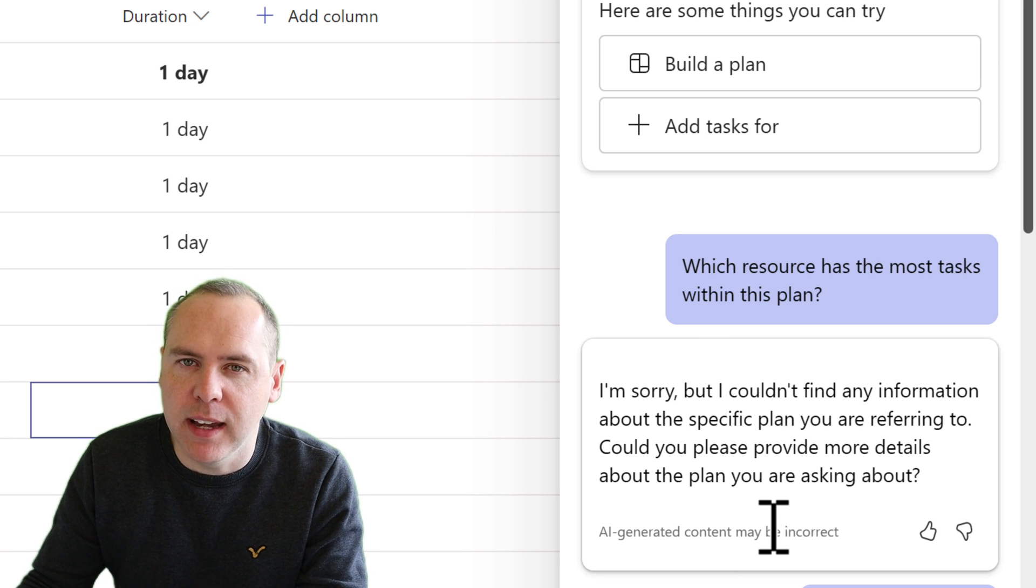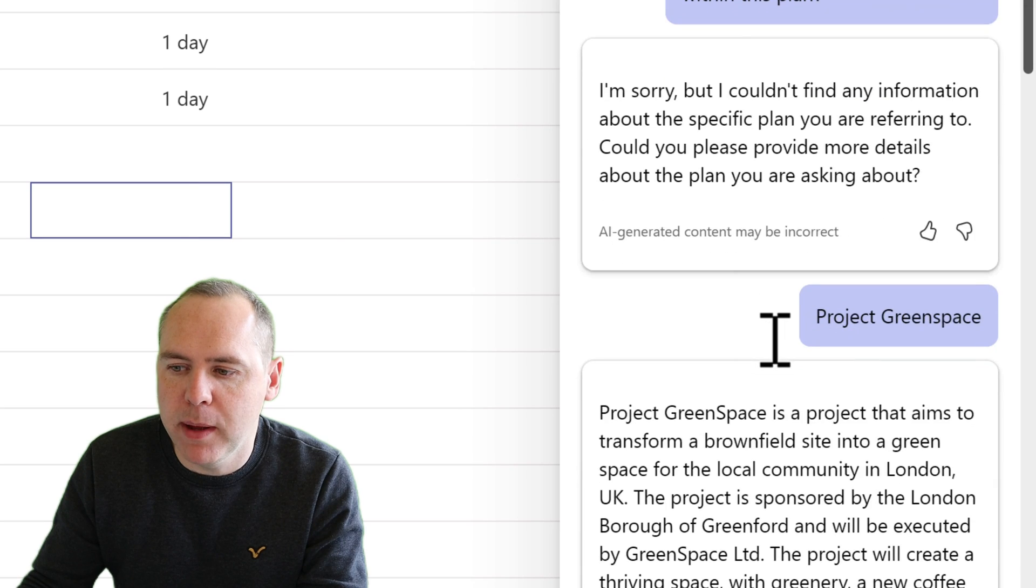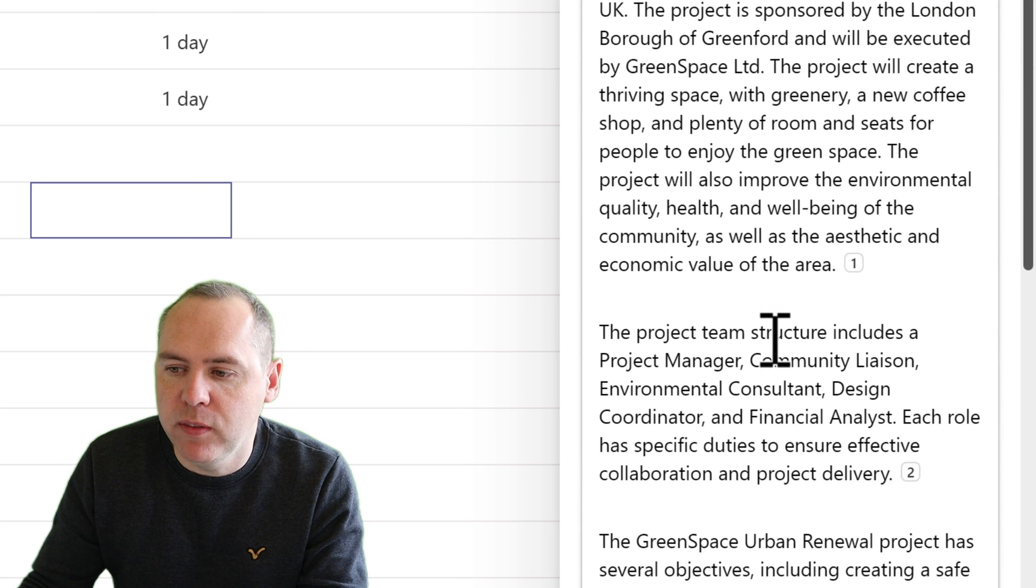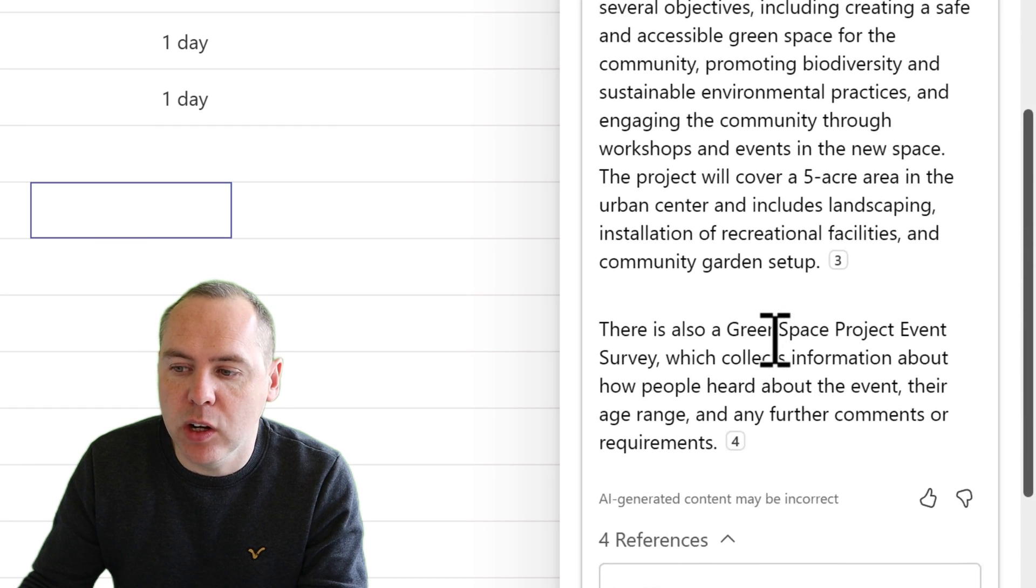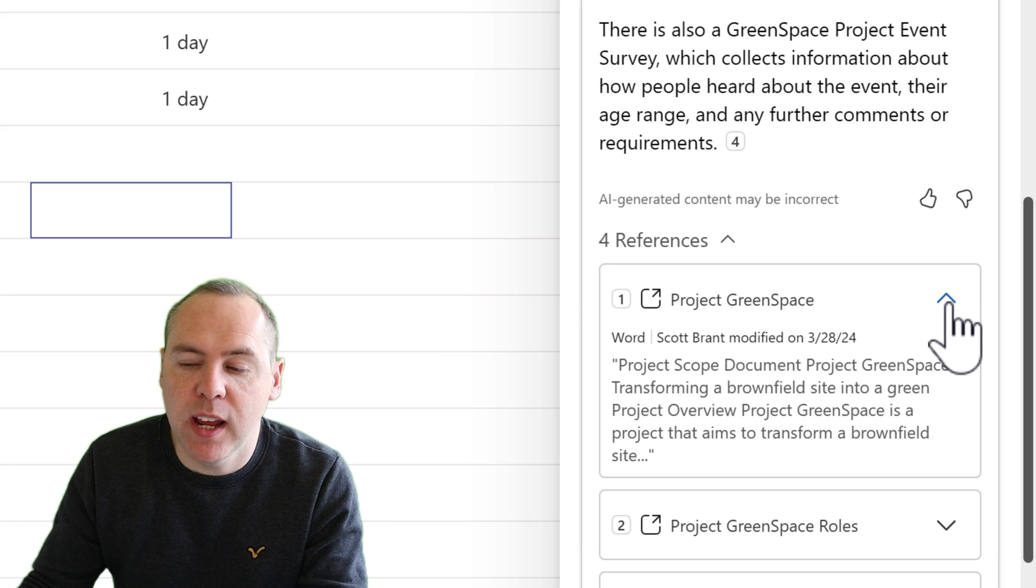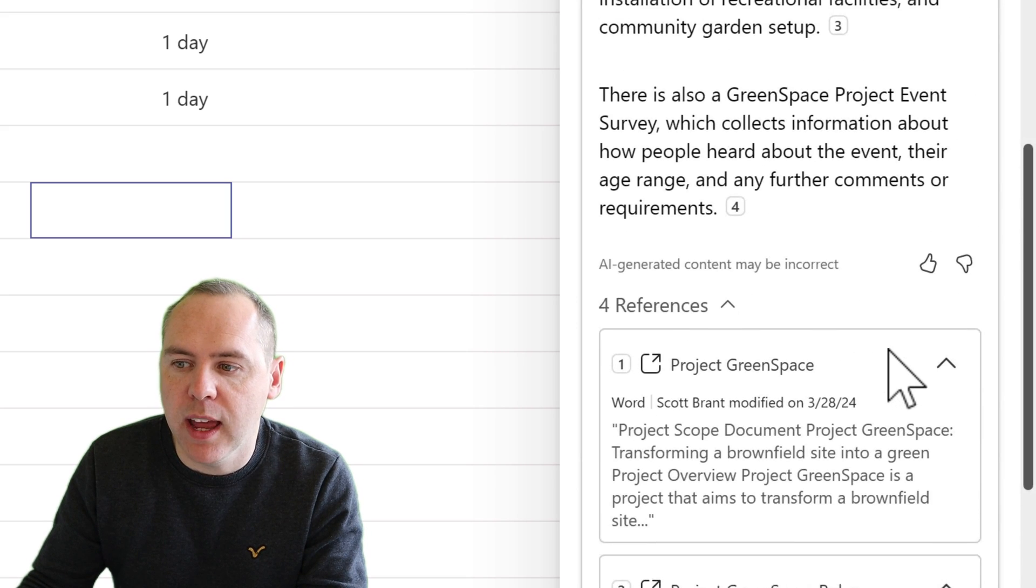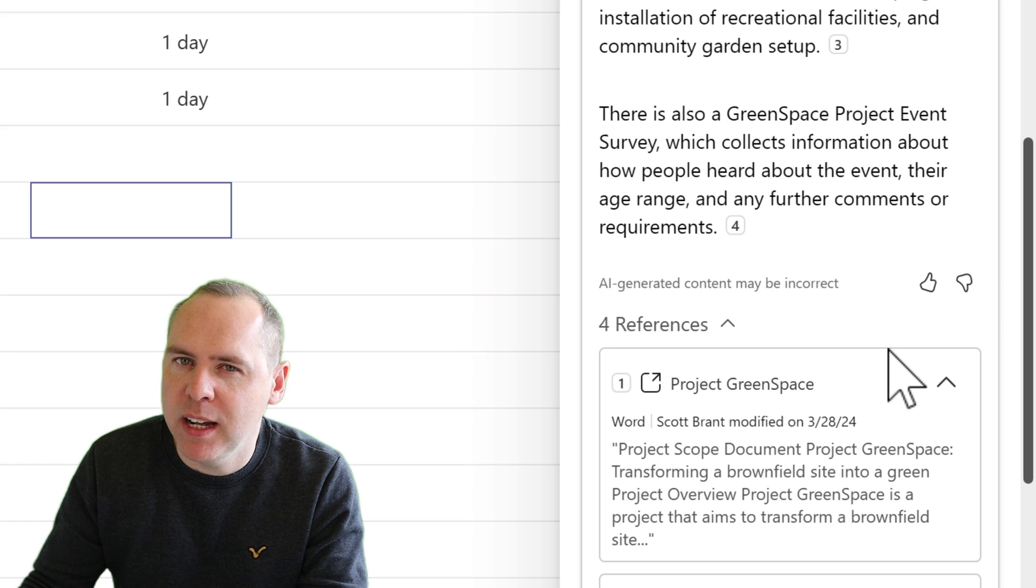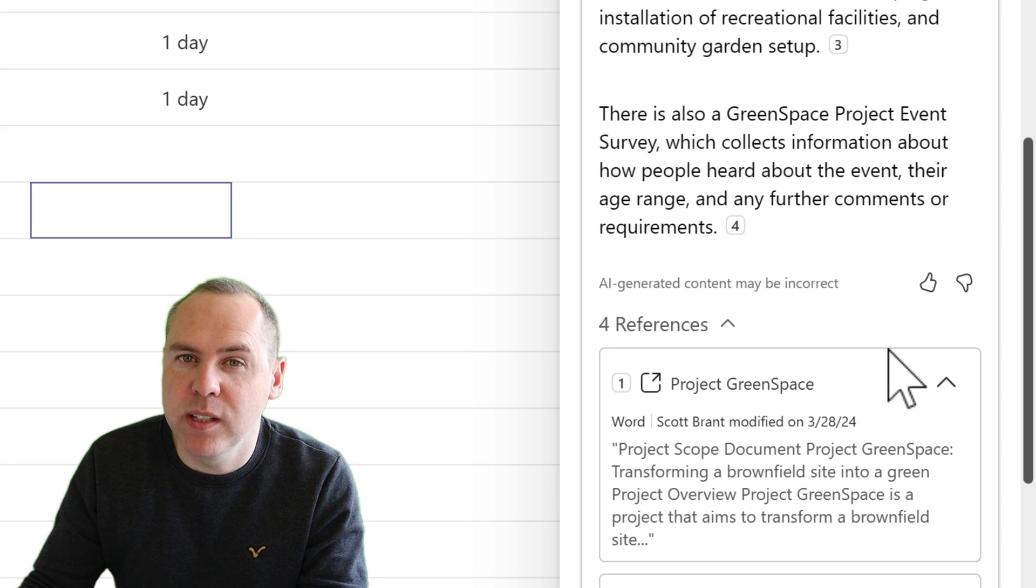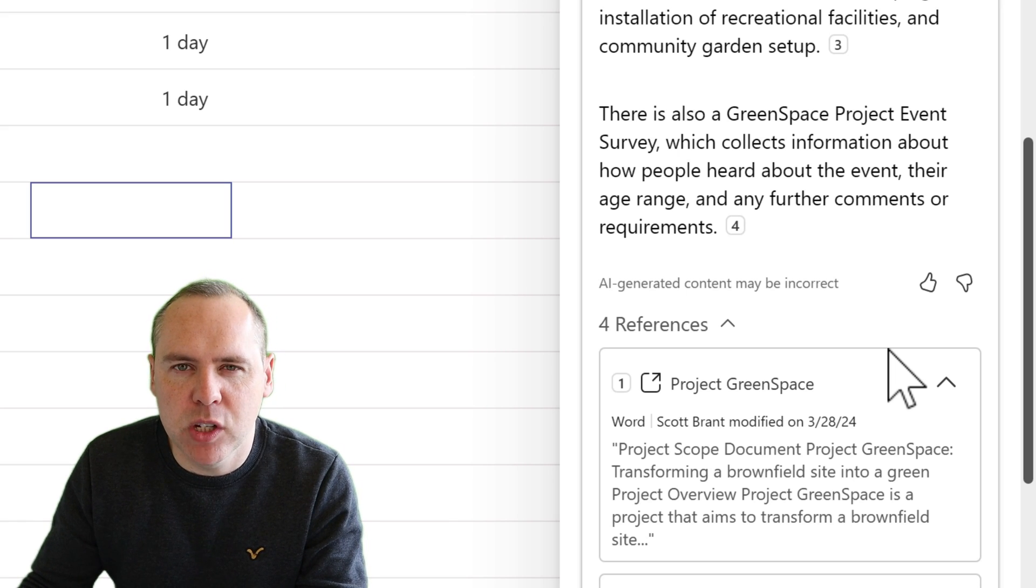Now very useful that Copilot then provided more information. And you'll also consider that this information is not within the plan. No, what it's actually doing is the Copilot experience is looking across Microsoft 365, being within Microsoft SharePoint and Teams, and it's pulling back relevant information regarding the project that it found elsewhere. So I can actually work out the project and who's assigned to it. But sadly, from a planning perspective, it seemed to be the information inside of my plan around resources was largely unavailable to use. And that's one of the big limitations right now. We can't do much around resource management.